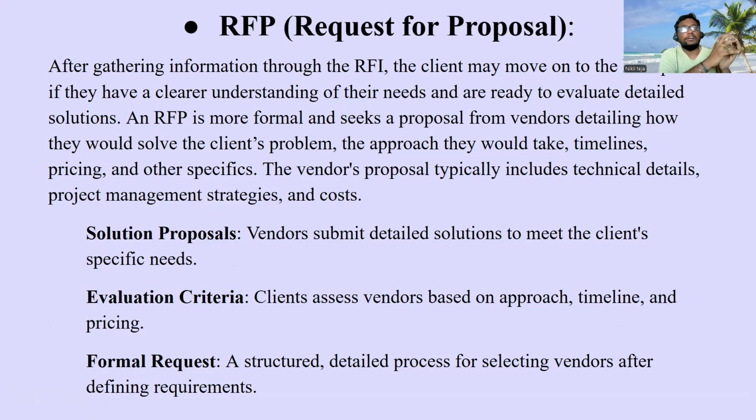First the RFI process is there, right? He will be refining some vendors. He will be cutting off some vendors, and he will be sending the RFP to particular vendors so that only they can reply to the RFP process. So the client may move on to the RFP phase if they have a clear understanding of their needs and are ready to evaluate detailed solutions.